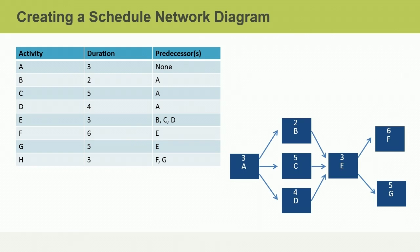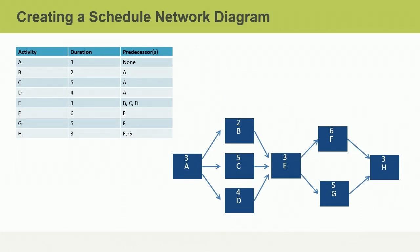There is one last step. Can you complete the network diagram? If you'd like more time to think about your answer, just pause the video and resume when you're ready. Activities F and G are predecessors to activity H. They converge into this last activity.